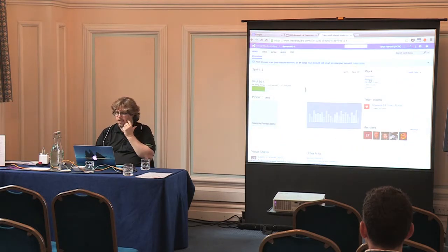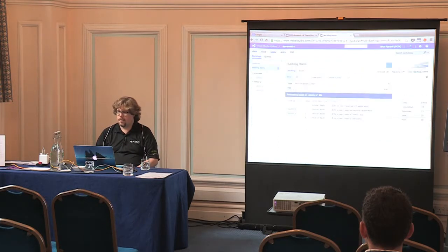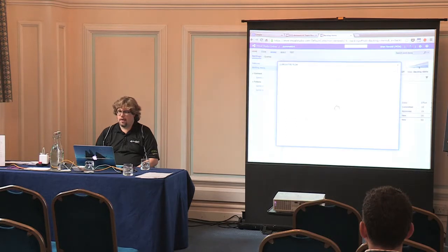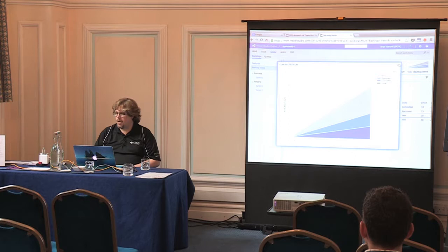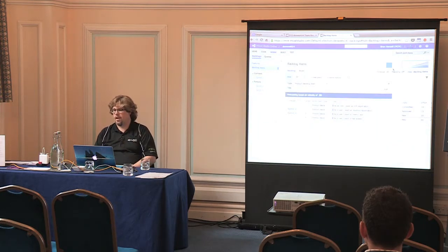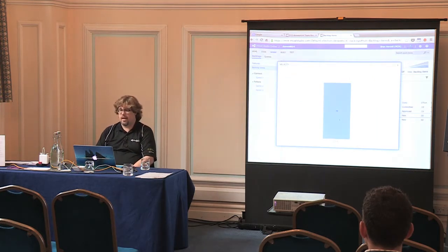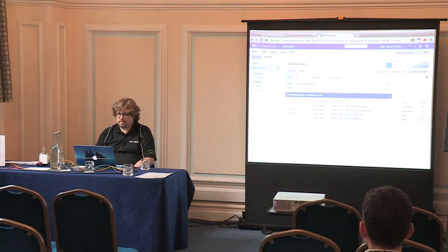And when you go to the backlog, you have your cumulative flow, okay? And right now we have a big spike. What we want to see is just a nice continuous flow with fairly even bands, right? We always want to see that going on. And then you have your velocity here, which right now is showing 10 based upon the work we specified.